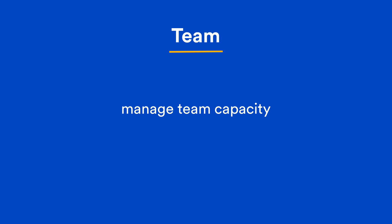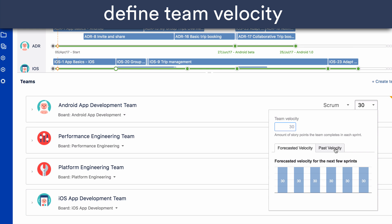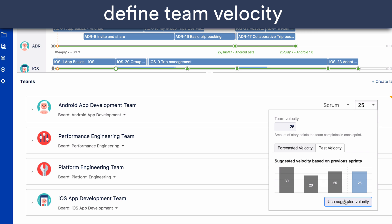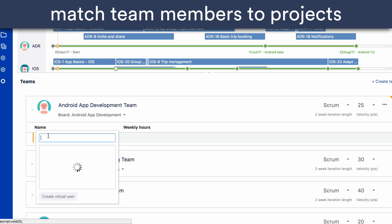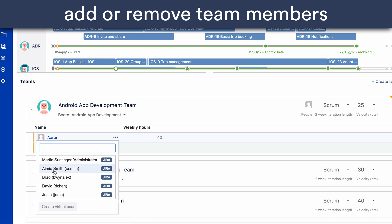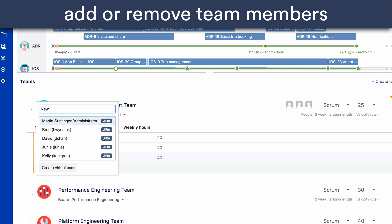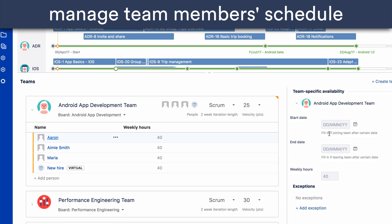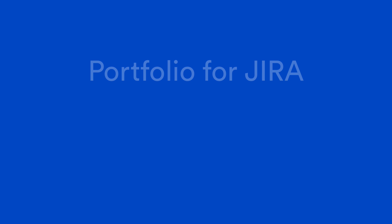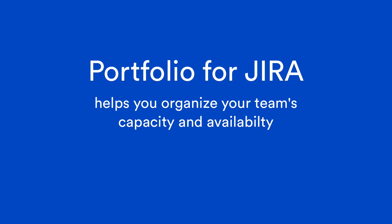Next is the Team section where you can do your capacity planning. This is where you can set the team velocity and manage availabilities. Define team velocity based on past performance, match the right team and team members to the projects they're working on, add or remove team members to each team, and manage individual schedules to take into account work hours and absences. Portfolio for Jira helps you organise your teams and make the most out of their capacity and availability.